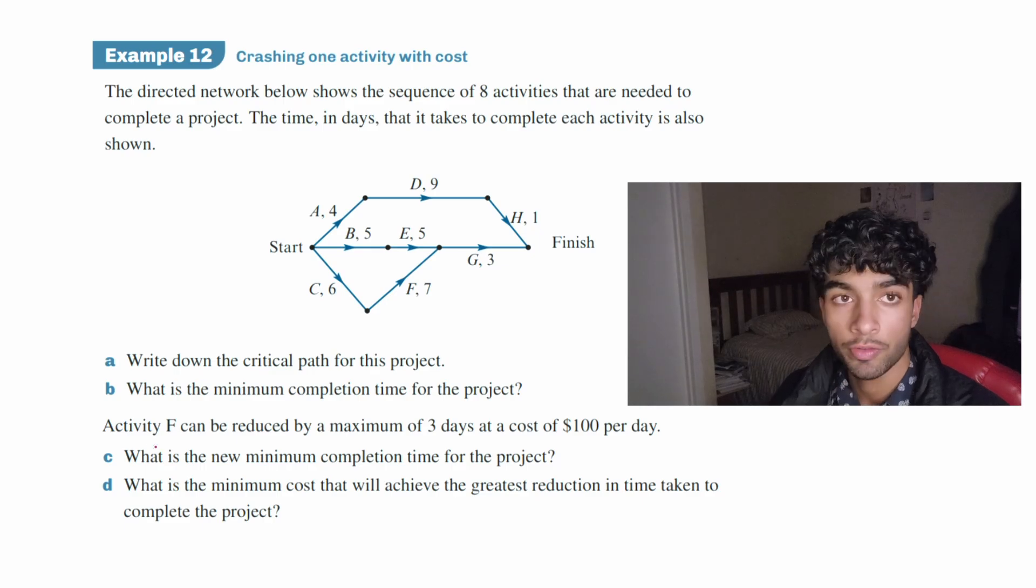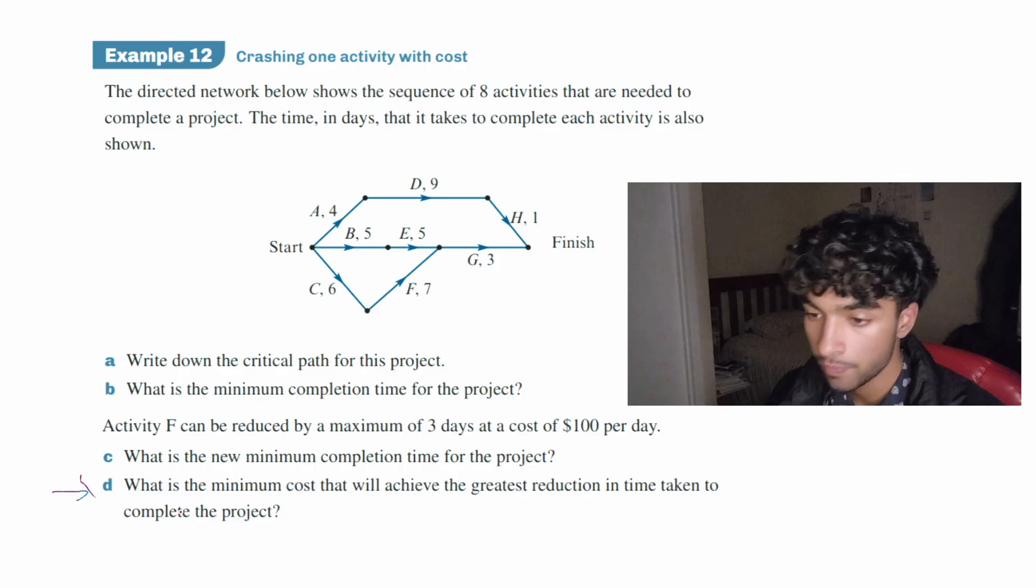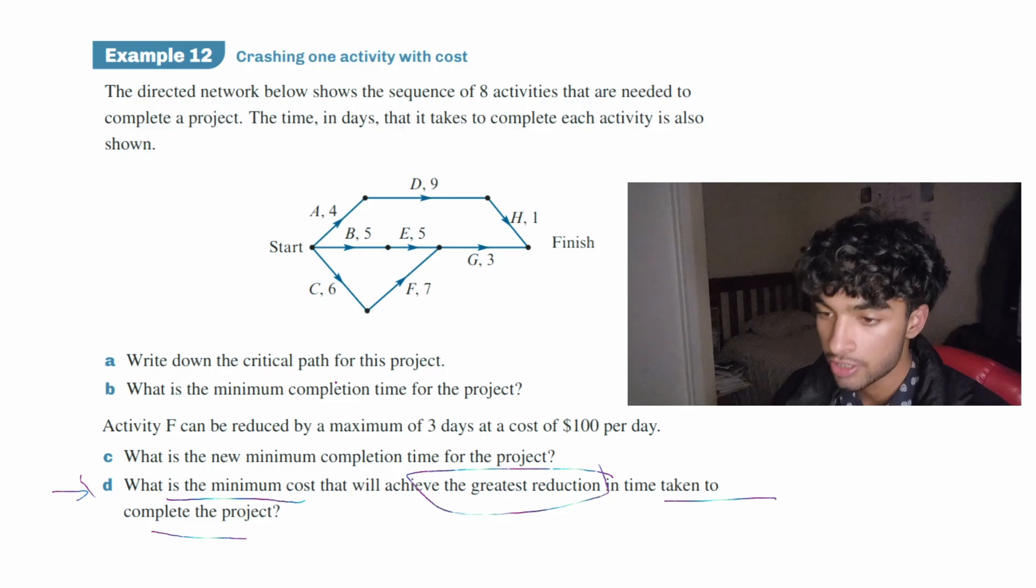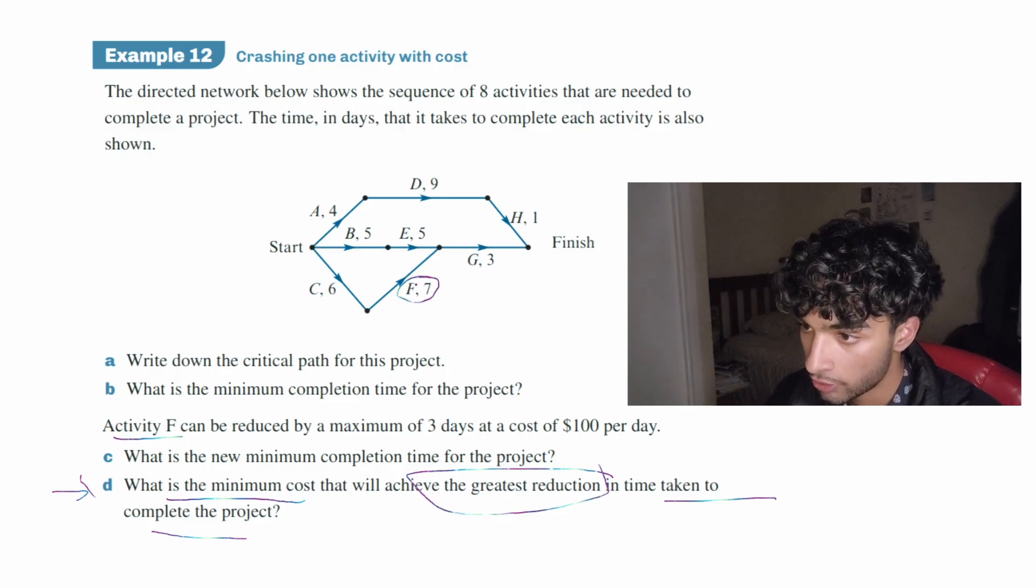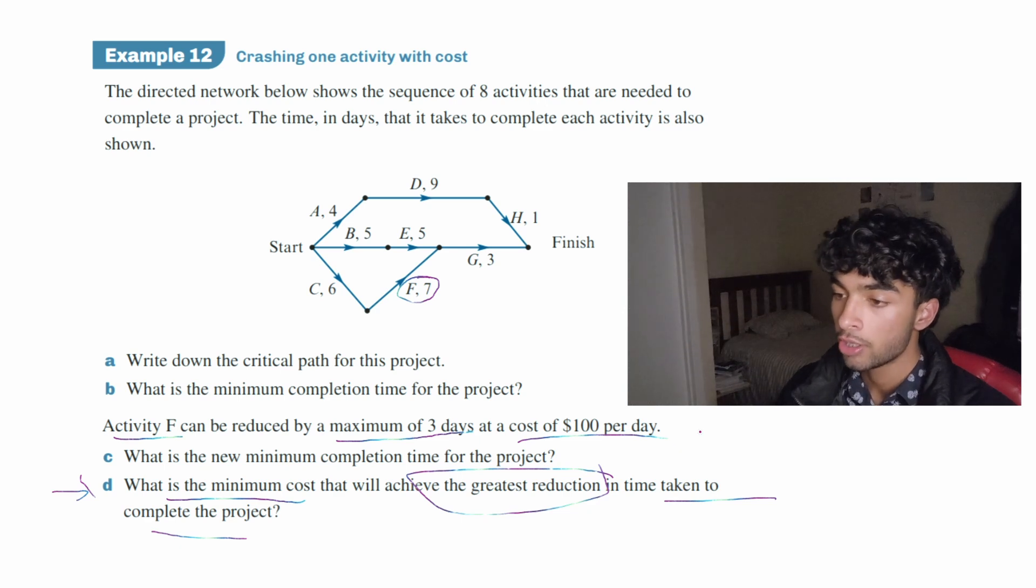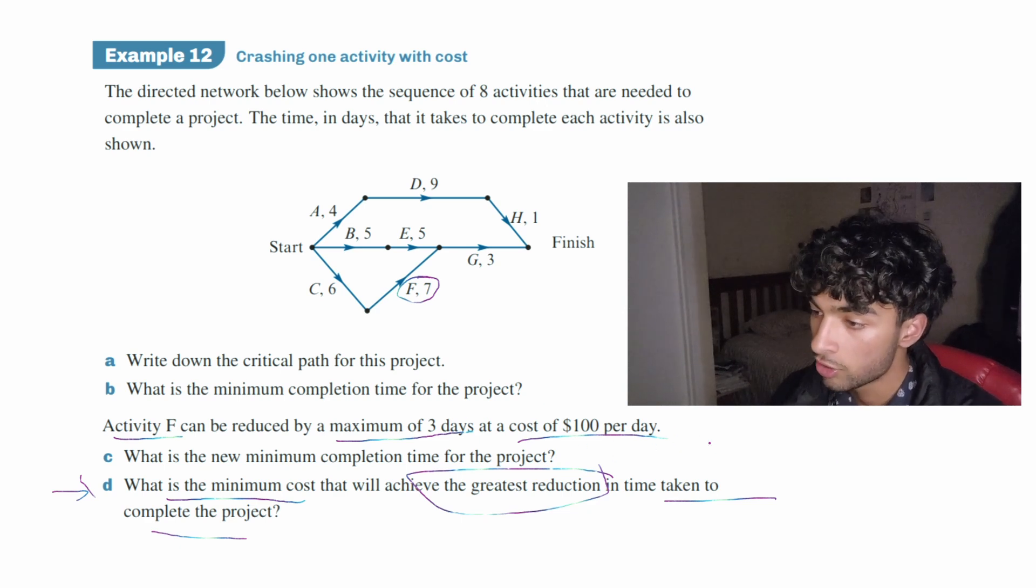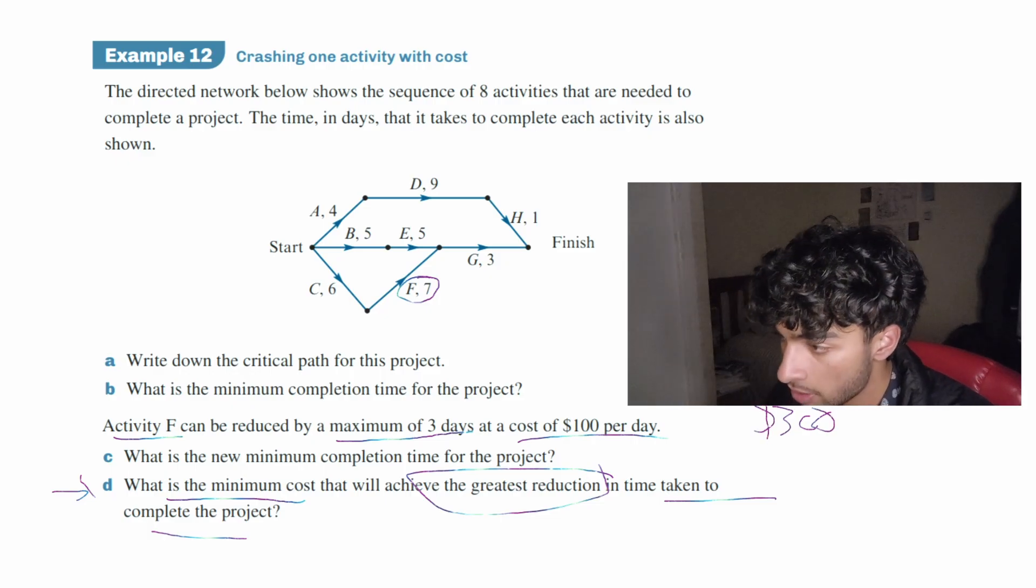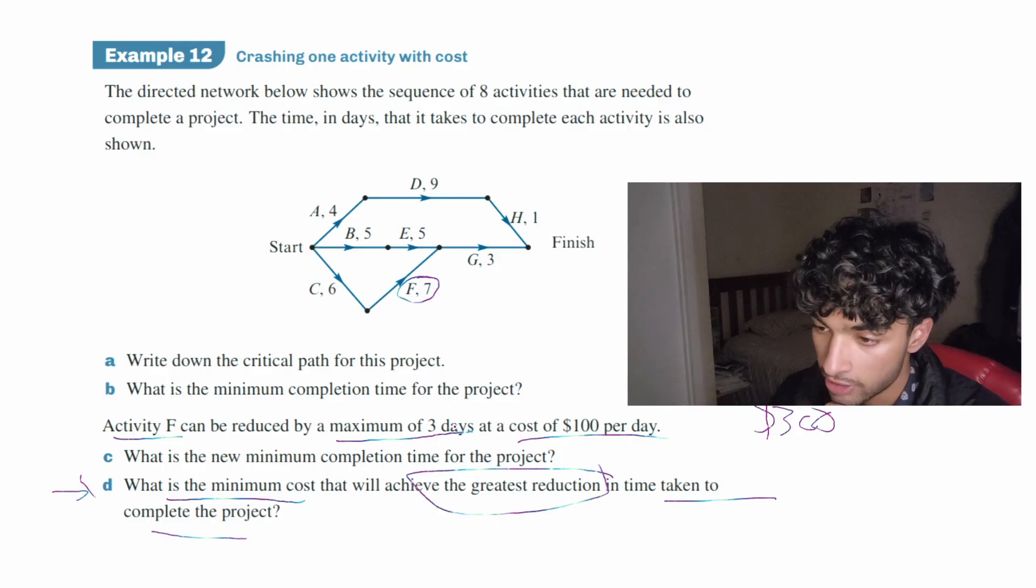So we have a question from the Cambridge textbook and we're going to be doing question D for now. What is the minimum cost that will achieve the greatest reduction in time taken to complete the project? And this is given the information that activity F can be reduced by a maximum of three days at a cost of $100 per day. So the thing is, the maximum will end up costing three times 100, so $300. So if we use up the $300, it actually might not be necessary and we could end up wasting money. So we need to find the minimum cost.